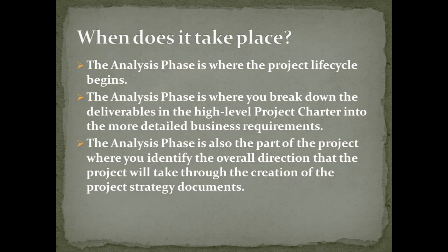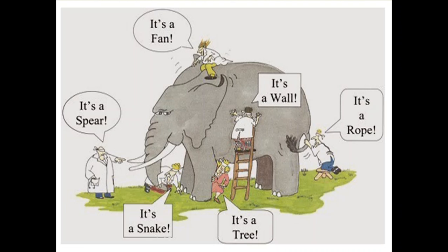Analysis phase is where you break down the deliverables in the high level project charter into the more detailed business requirements. So the high level scope is drilled down to get the detailed requirements. The analysis phase is also the part of the project where you identify the overall direction the project is going to move through, and you also end up creating the strategy documents. Strategy documents are nothing but how we are going to do things, be it development, be it testing, how the process is actually going to take place, and that gets initiated in the requirement analysis phase.